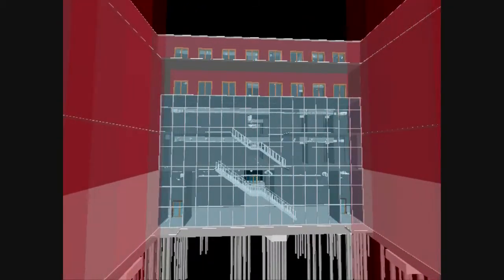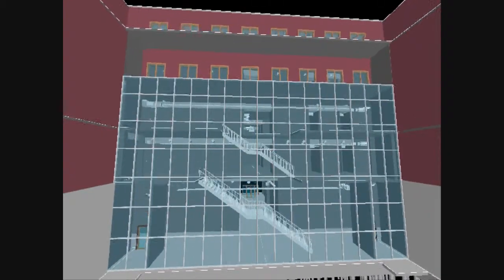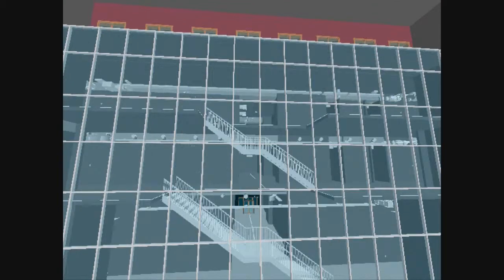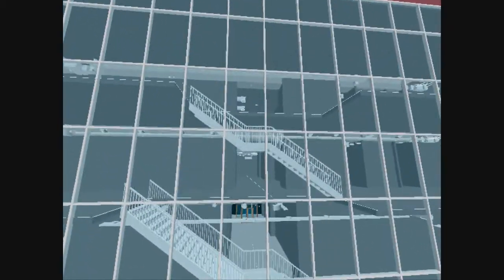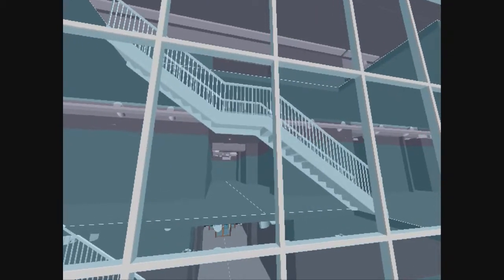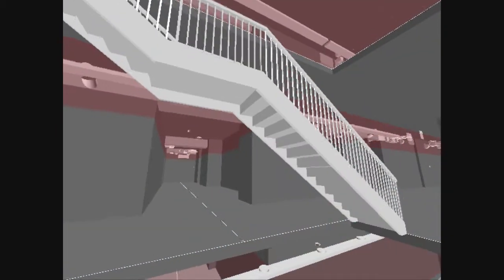To avoid the risk of breaking glass during the construction process, the curtain wall systems will be installed only after all exterior partitions have been completely framed, waterproofed, and bricked. After the curtain wall systems have been installed, the exterior doors and windows will be put in place to complete the building shell.